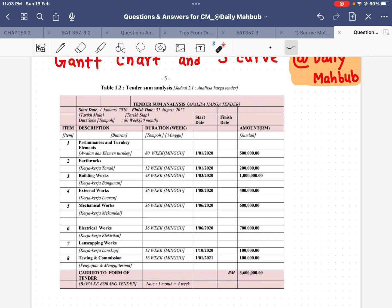Each item is described. For the first item, preliminaries and turnkey elements, it will take 80 weeks to finish. For artworks it will take 12 weeks, for building works it will take 48 weeks, and external work will take 36 weeks. The start date is mentioned but not the finish date.